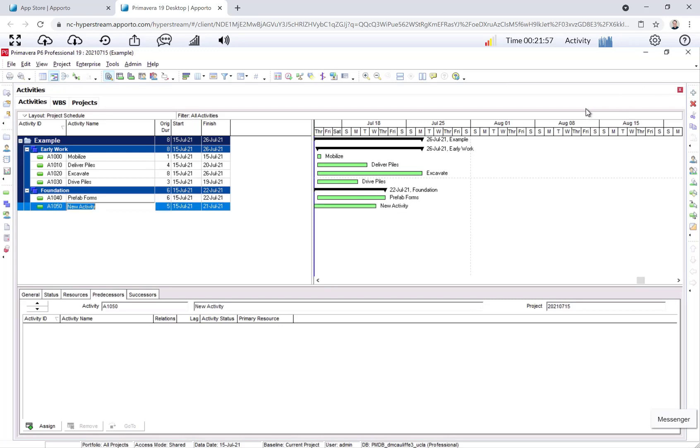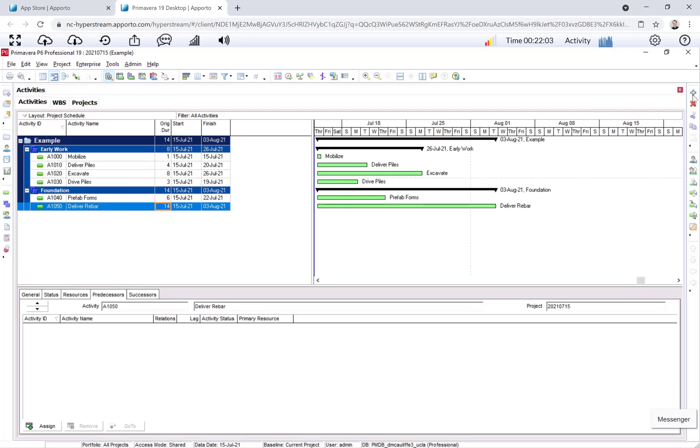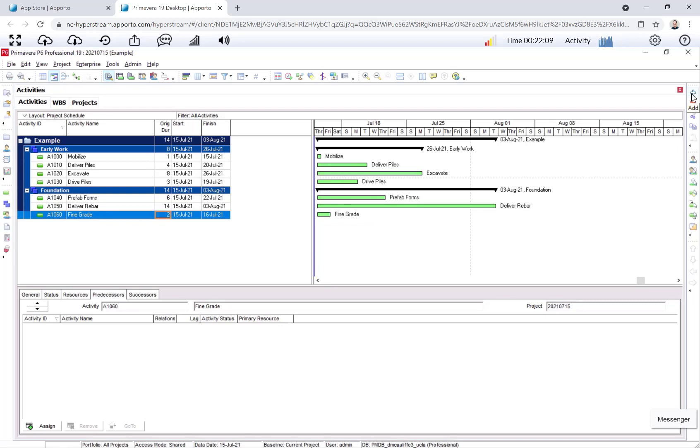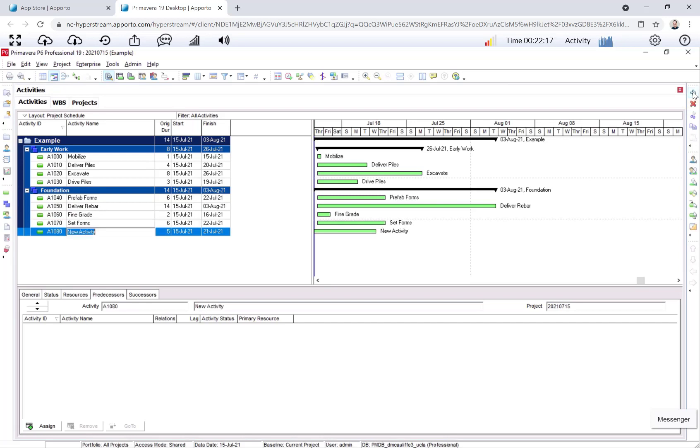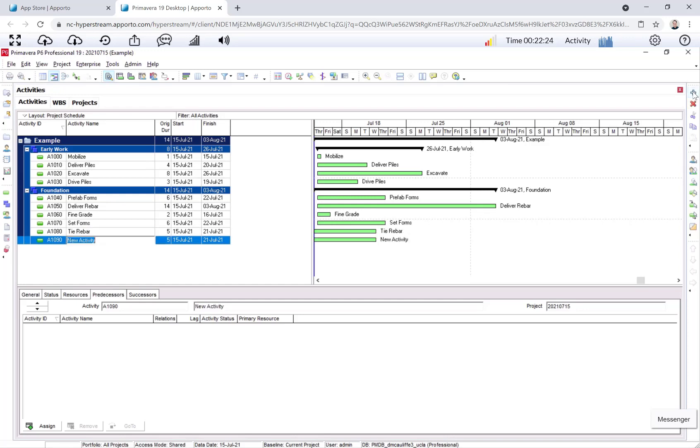Deliver rebar takes 14 days. Fine grade takes two days. Set forms takes six days. Tie rebar takes five days. And finally, pour concrete takes one day. Okay, so we have all of our activities here.